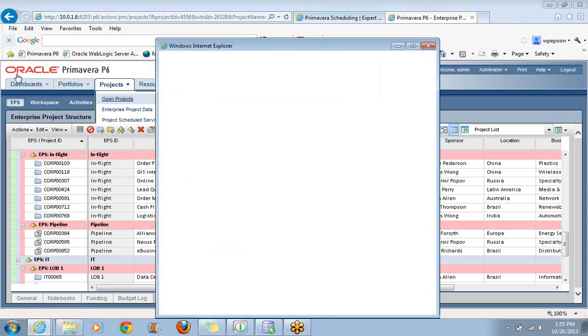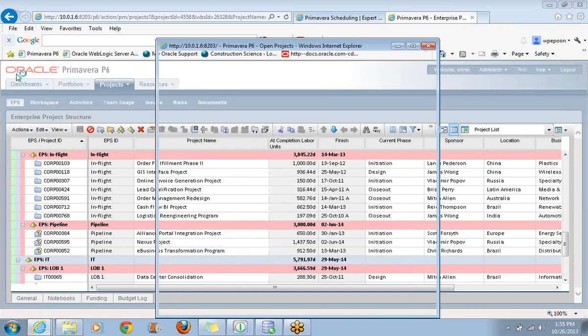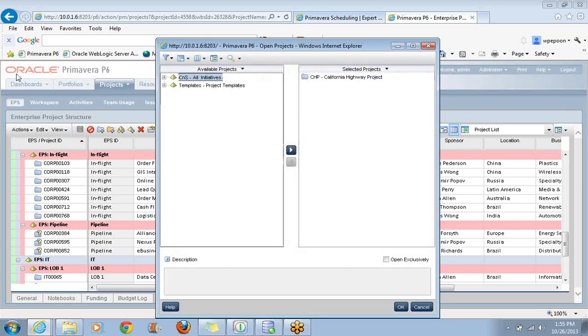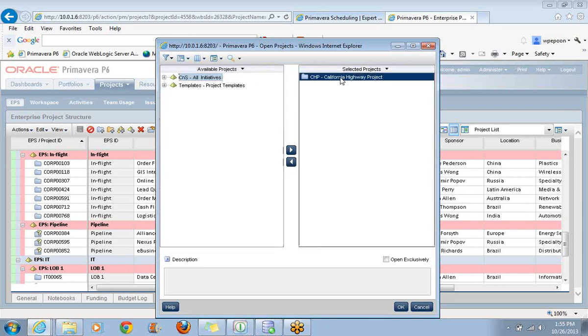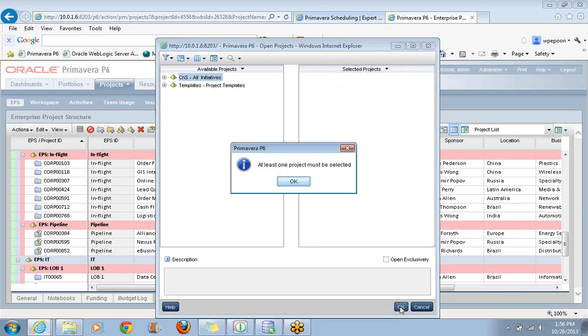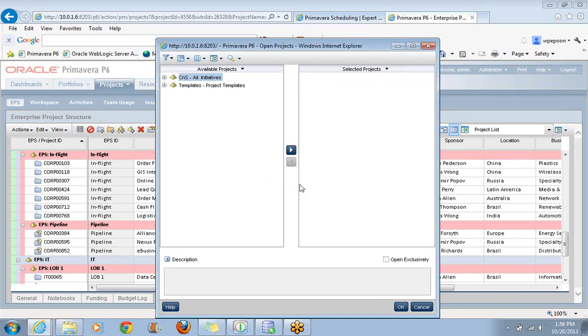To see all the open projects quickly, rather than scanning down through this list, what I'll do is I'll come up here to Projects and click on this arrow, and then I'll go to Open Projects. I'm clicking on that arrow specifically because that's a menu drop-down. If I just click on the word Projects, that's taking me from one of these major tabs to another.